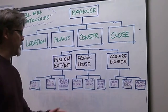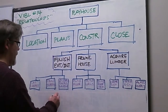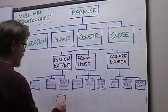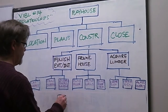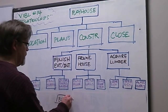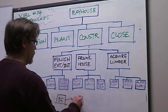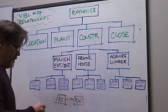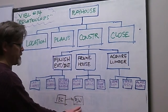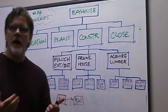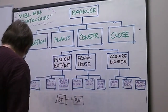So we need a floor before we can build walls. We would have a hard logic relationship of building the floor first before we could build the walls. That is a finish-to-start relationship, and that is what we call a hard logic relationship.